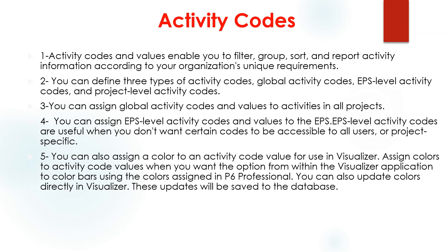In this lecture you're going to learn how to assign activity codes, why it is important, and how you can do it. Activity codes enable you to filter, group, and sort activities. You can add many codes — for example, a code for excavations, a code for concrete, a code for design activities — and you can filter all these codes. You can assign codes at the project, globals, or EPS levels.